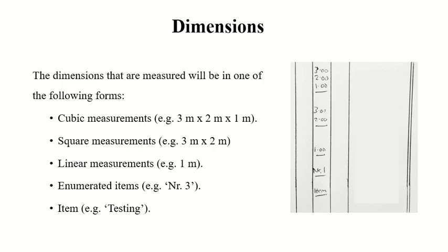Okay, so it's like lump sum price. Have you heard about it? Lump sum, full, total. When you go to a car mechanic, he will tell you your car has an oil problem and a tire problem and this problem. Then you tell him, just tell me the total price. This is called an item. Total of the whole thing without any quantities. So all types of testing, one item. This means the whole testing of the whole work, one item. Clear or not?